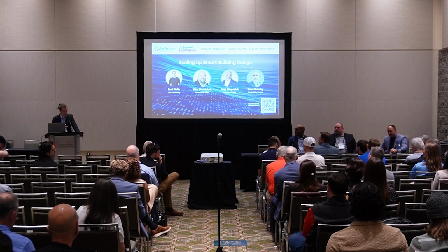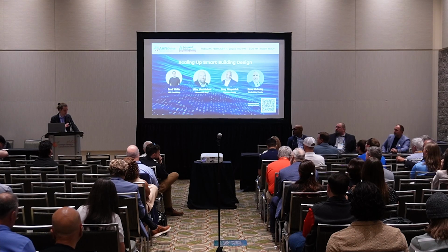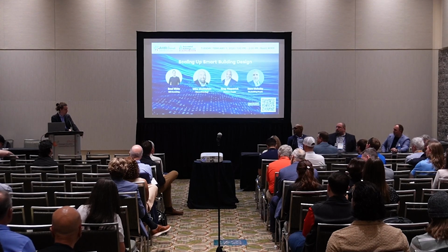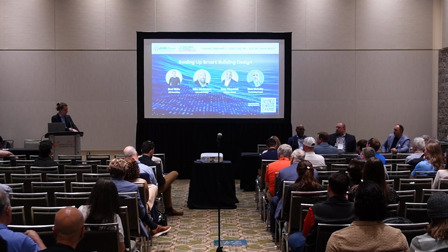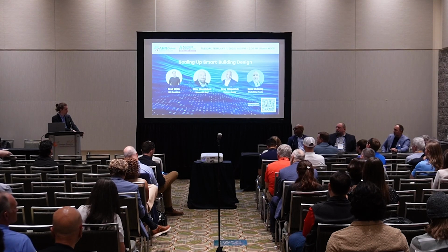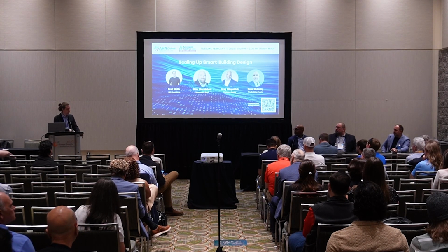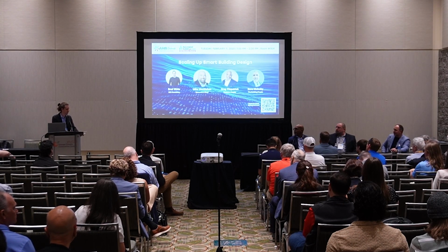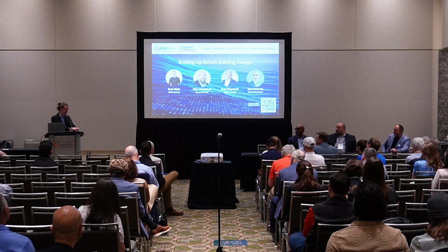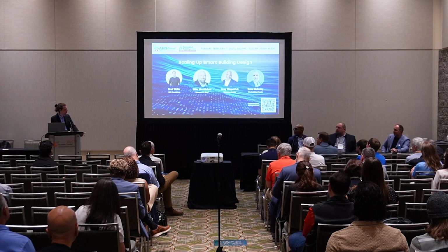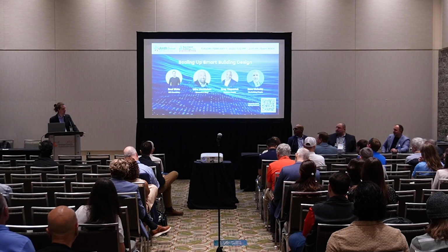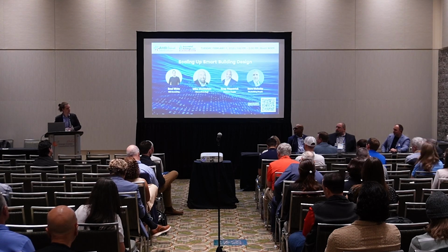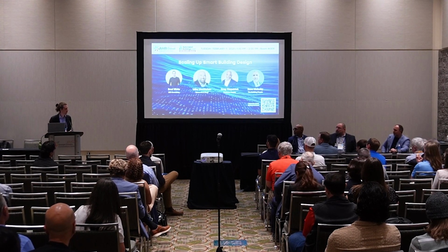A point that I always make about commissioning is that commissioning isn't the thing that happens at the end of the project. In my mind, it starts during design. If you're hiring a third-party commissioning agent, get them engaged at the design phase to review the specification and make sure it's something they can actually commission, because they may look at it and say, you're missing all these sensors that I need, or, I don't know what this sequence is supposed to do. Having that lens on the specification ultimately makes it a better specification, and makes it something you can successfully commission at the end of the day.